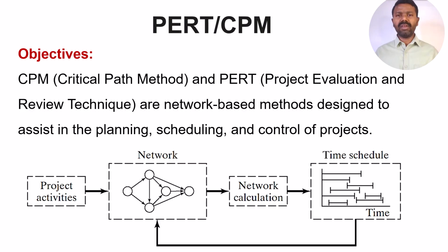For example, if they want to make the pillars of the bridge, they first need the procurement of the steel material, and they also need some material which can hold the concrete in the pillar. So there are some activities which depend on each other. Finally we can tell that this project will take this much duration. And here we are going to learn one by one, sequentially.